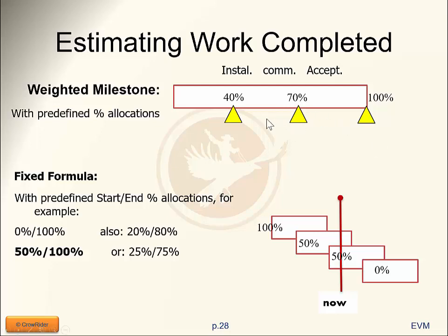So you will automatically notice, if this drags on and installation takes longer than expected, that you are still at 0% while they are telling you you're nearly finished installation, but you're still at 0%. This is swapping accuracy for objectivity.